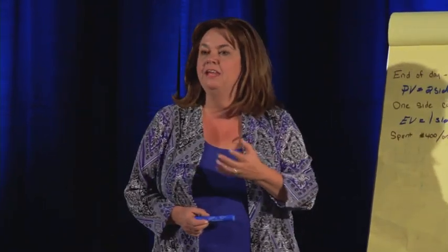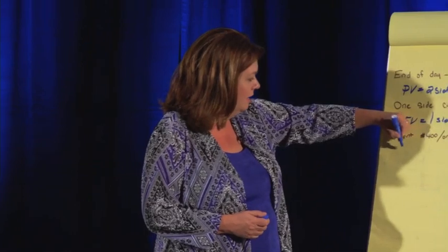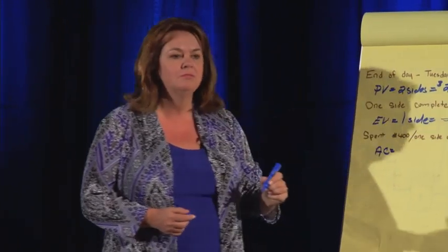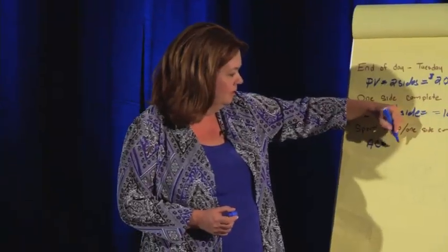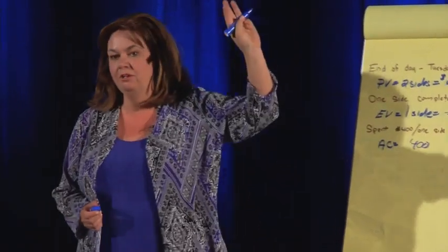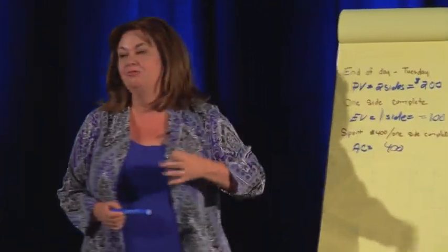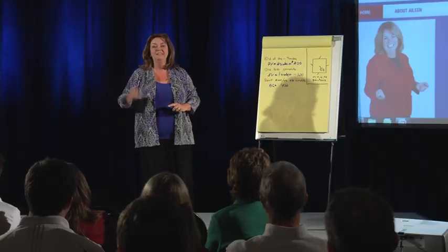The last critical term we call actual cost. Often, this is the easiest one to figure out. So on the exam, if they ask you what is the actual cost, this is a measure of how much we've spent so far. What's our actual cost? $400, great. So already, you get 3 of the earned value questions right on the exam. We're doing great as far as preparing for the exam, but from a project standpoint, how are we doing? Bad.